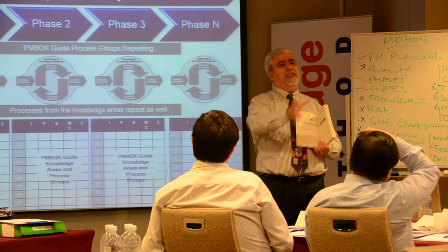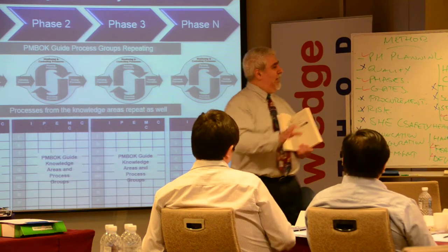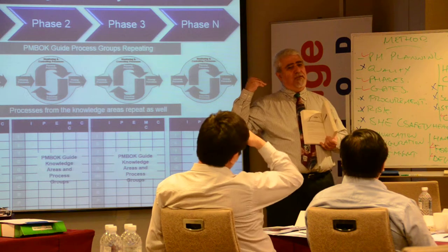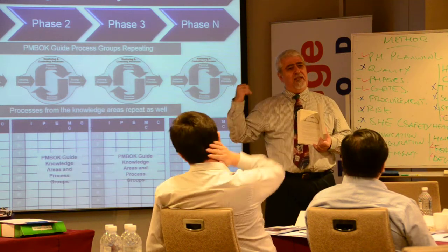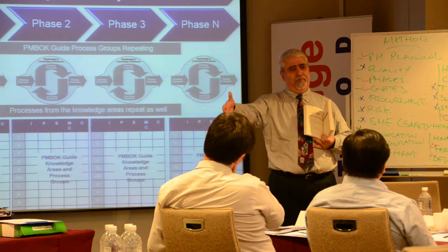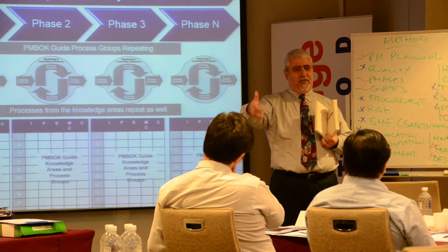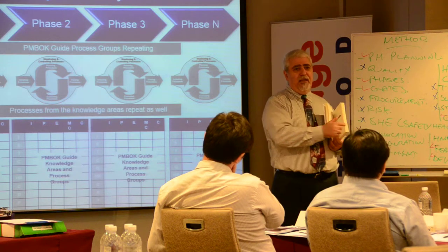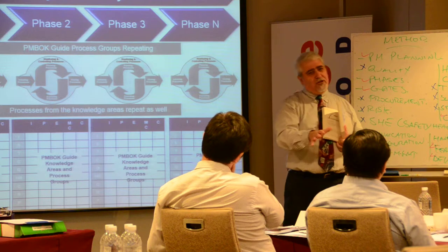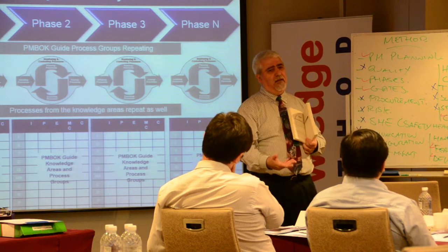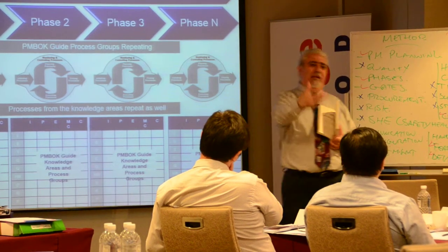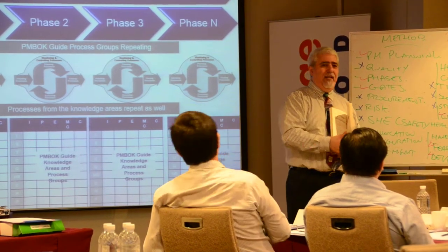Let's talk about scope management as an example. The PMBOK includes a scope management plan — it used to be there, they took it out, and then in the last edition they put it back in. So you need to plan how to manage scope, and there is a process for every knowledge area. These are management processes. Then in the scope area, you have to collect requirements, develop the WBS, and write the scope statement. This is detailed planning.